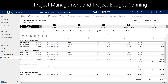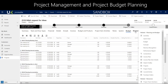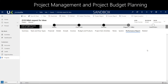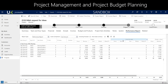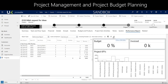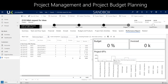Once approved, we can directly convert our budget plan into Gantt chart planning. I would like to show you that we have a status within our project that is set to 'to be started,' with performance that hasn't started yet. You will see that we have defined a budget based on our work plan — we can see the budgeted hours, the budgeted revenue, the budgeted cost from the budget template. Once the project unfolds, the actuals will populate in this section, allowing us to directly manage our project and see how well we perform.